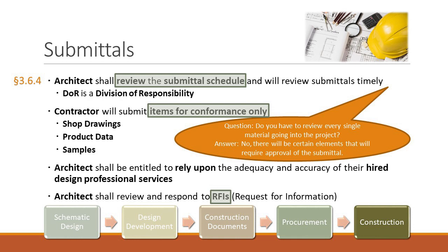The contractor, when they hire the fire protection system installer, will make sure that installer has their own engineers to design. So all the architect has to do is provide design criteria. A wet system, over 10,000 square feet, in a factory warehouse, in accordance with the code in Illinois. Something to that. That's the design criteria. Everything else, the contractor has to provide. Other areas like curtain walls, the contractor will do that.